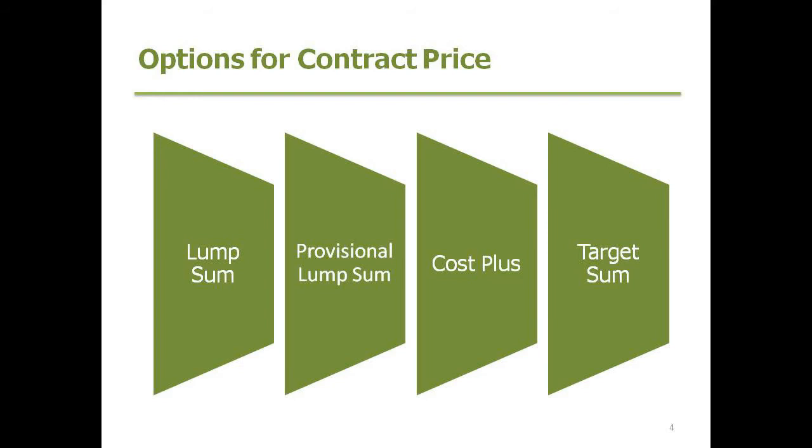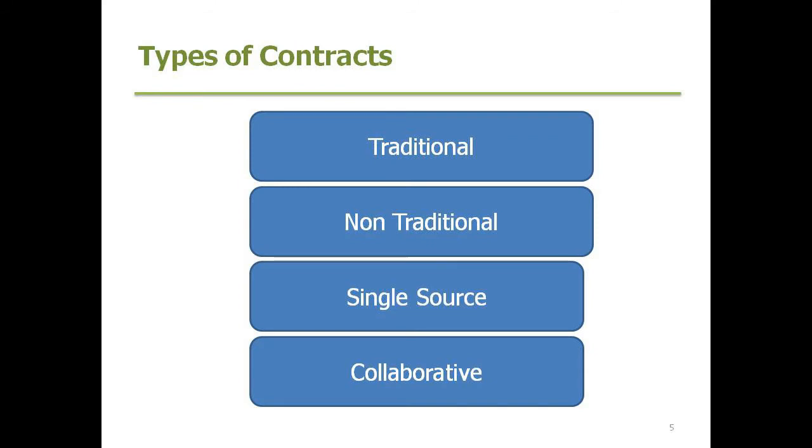With this, though, there's an added advantage that there's often a profit share at the end of it between the client and the builder, and the final price is then what we call a target sum. There's no real incentive, though, with this for the builder to save money. Having said that, I say that mainly because the closer he gets to the target sum, the better. So that's only something to consider with the target sum. But having said that, the start-up on site and the amount of documentation that's required quite often get the project up and running much quicker than a full lump sum project.